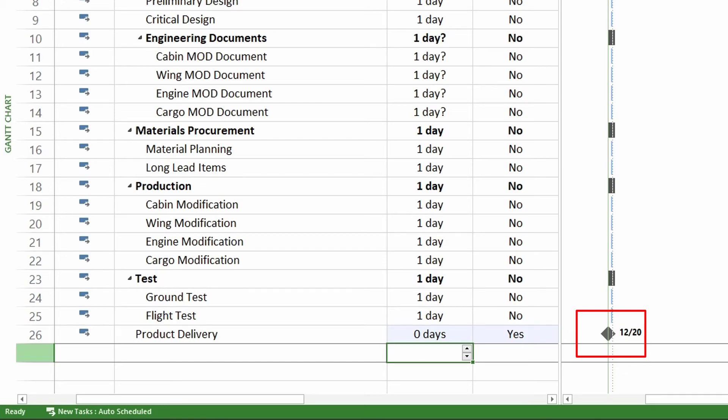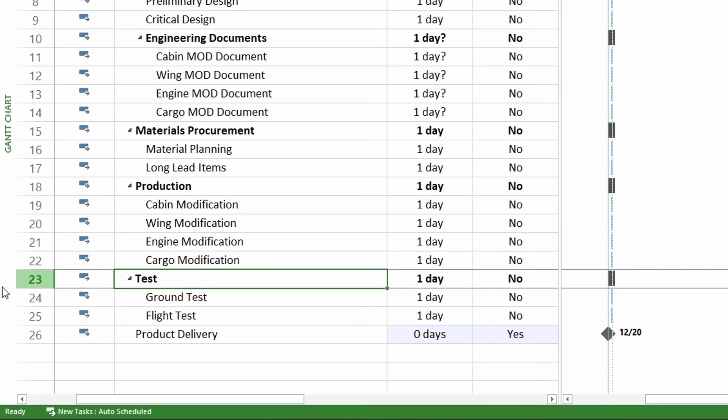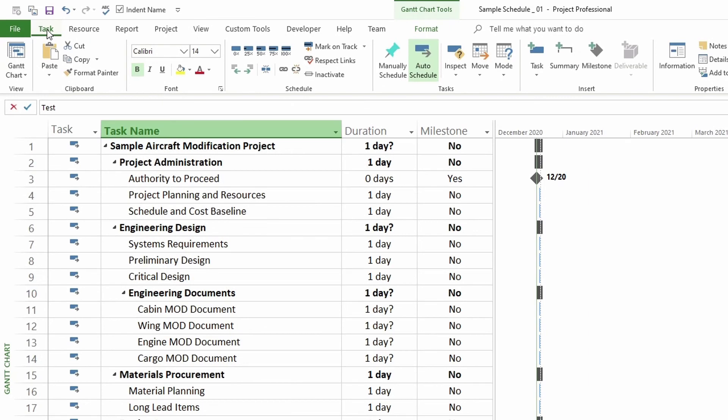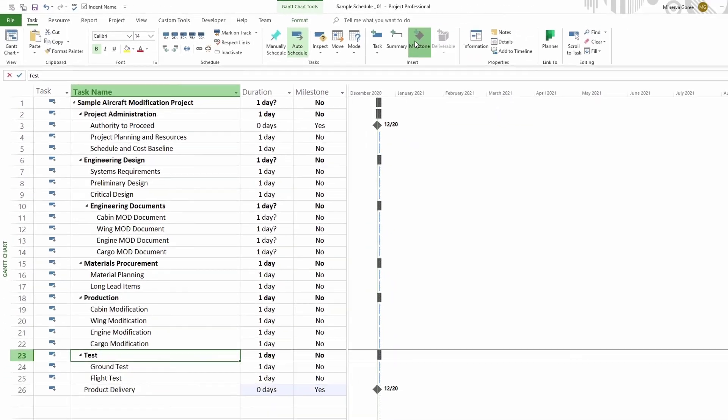The last thing I want to show you is adding a milestone to your schedule that is currently not on your schedule. So first you have to identify where you want your milestone. I want it right over the task test. So this one right here in my schedule is task 23. I want the milestone to be under cargo modification. So I highlight the column 23, which is test. And then I go to my tab task and then go over to insert and I will insert milestone. But before I click on it, I'm going to read the tooltip, which says insert milestone, insert a milestone task to mark an event in the project. Milestone tasks are a task with a zero day duration.